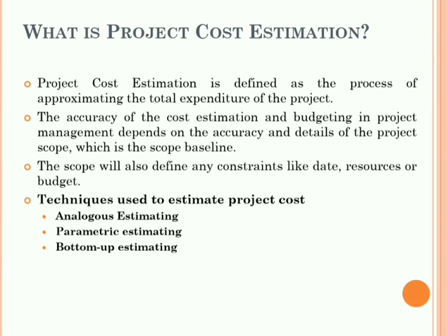Without risk management, the budgeting process is not complete. The risk assessing process considers factors like time shortage, availability of resources, development team experience, and the technology that is used here. The risk assessment can amount to between 25 to 30% of the overall project cost. This is how we are going to make the plan for the purpose of budgeting a project.